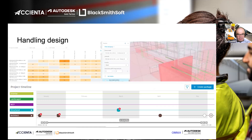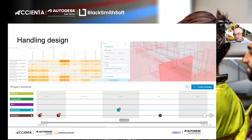When working with design, the most important part is ensuring that if you are working in parallel with another discipline — say you are MEP and someone is working on architecture — any clashes are identified as you are building the project. This project timeline has packages: once you consume a package, you have a reference to what other people are working on at that specific point in time. You know whether you have a clash and can rectify it before issuance. Everyone knows what everyone is working on, they are always up to date, and there is a live matrix summary and visual view of any issues.